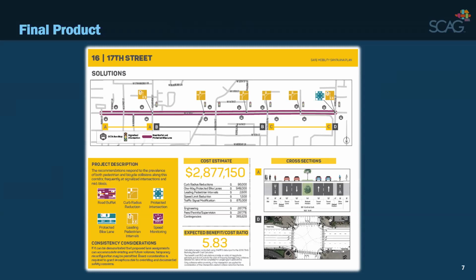So you want the final product to include some amount of top priority projects. In the active transportation plan that I did, there were 35 projects identified. In the complete streets plans that I did, one had 5 projects, the other had 15 projects. And these projects are fully scoped out. They've identified where the improvements are going to go, what types of improvements there will be, and what the cost estimate is going to be for the project.